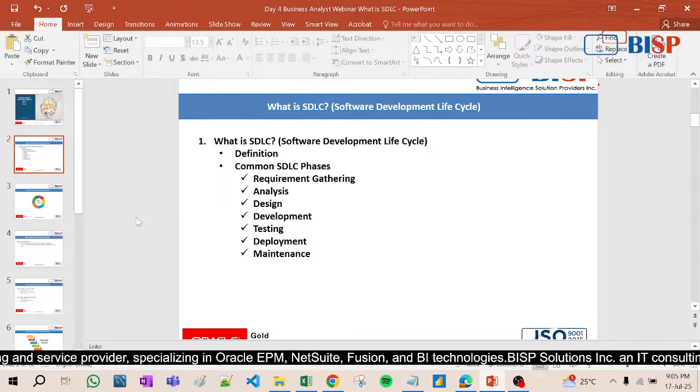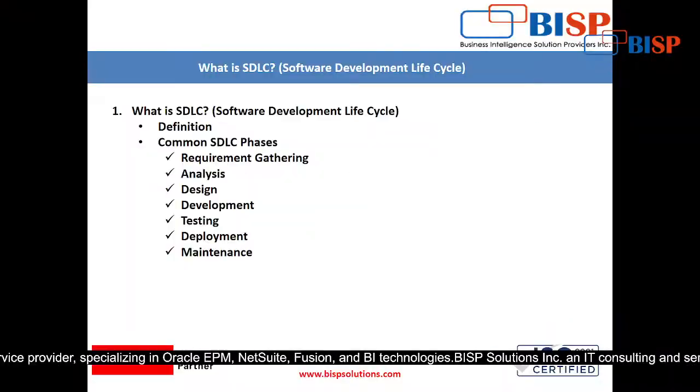So what we will do, the very first step is requirement gathering. Requirement gathering means asking the stakeholders. We know stakeholder means every person involved in that project from the client side, and also from the technical team side. We will ask the client what exactly is your requirement, what is your main target or what's the problem, what is the scenario, and everything is captured in the BRD.